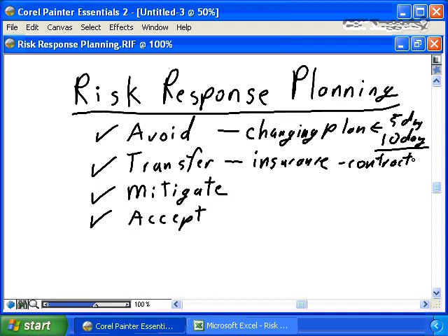Our team is not experienced in that specific aspect of the interface, so you create a contract with an external firm who are experts in developing the interface, and you say, I am transferring this part of my project plan to you. I am ensuring that you, the experts, have the responsibility for delivering this intricate, complex part of the project. You have transferred the risk from your project to an outside agency, and they have taken on the responsibility.